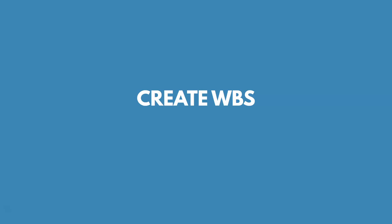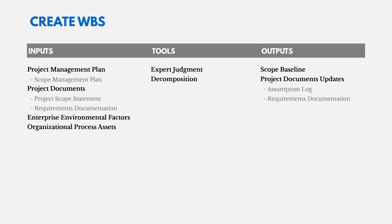Now let's talk about creating the WBS. At this point we've collected requirements and developed a detailed scope description. Now we take that description and decompose it into smaller components, which makes it easier to manage. The inputs for create WBS include the scope management plan from the project management plan, your scope statement — which is what you're going to decompose — your requirements documentation, and enterprise environmental factors and organizational process assets.